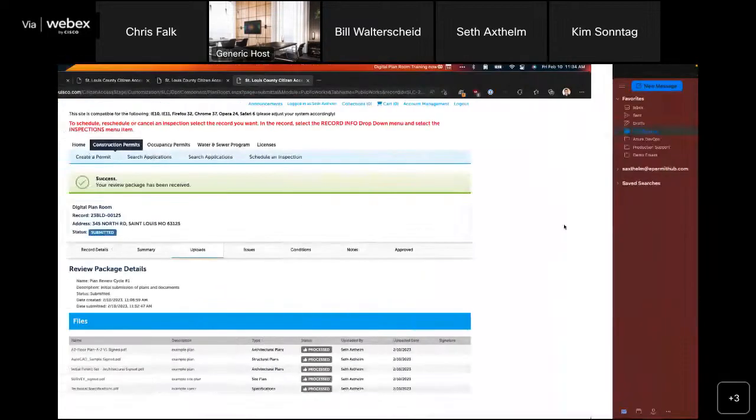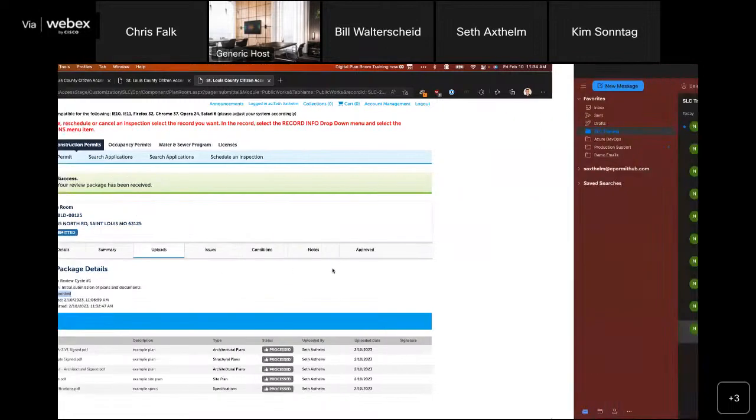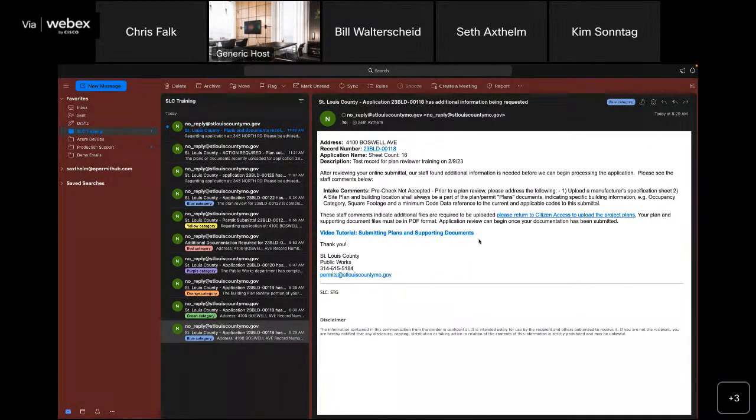Now, before I click that link, I'm going to point out to you that inside of the digital plan room here, what we're going to see is that this package has been submitted. Once a package is submitted and it's in a status of submitted, you can no longer make any changes to that unless county staff reopen that review package for you. And so that's what this particular email is communicating to you. Hey, we have a couple things we need you to do with the files that you submitted as a part of your review package. You need to return to Citizen Access to make those changes.